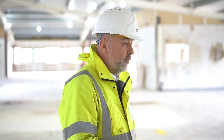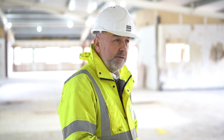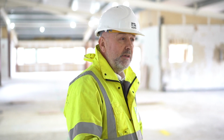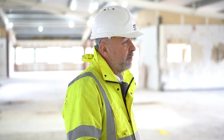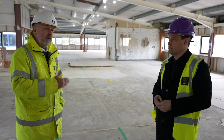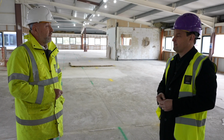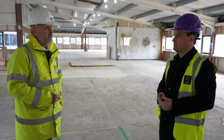Yeah, absolutely. So I would encourage developers and people entering the business to utilise these contracts, because they give you a lot of protection, they're fair, they're well established, and in a court of law it's very, very easy to prove when one side is behaving unreasonably and therefore where any fault may lie should any difficulties occur. However, long before that, there are mechanisms in it which, if you have a contract administrator, mean these matters can be discussed and resolved very quickly by just referring to the contract.